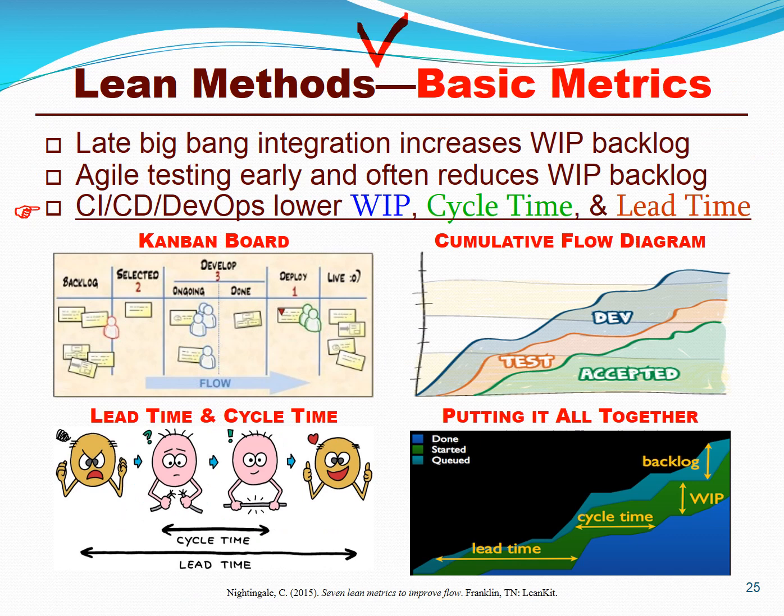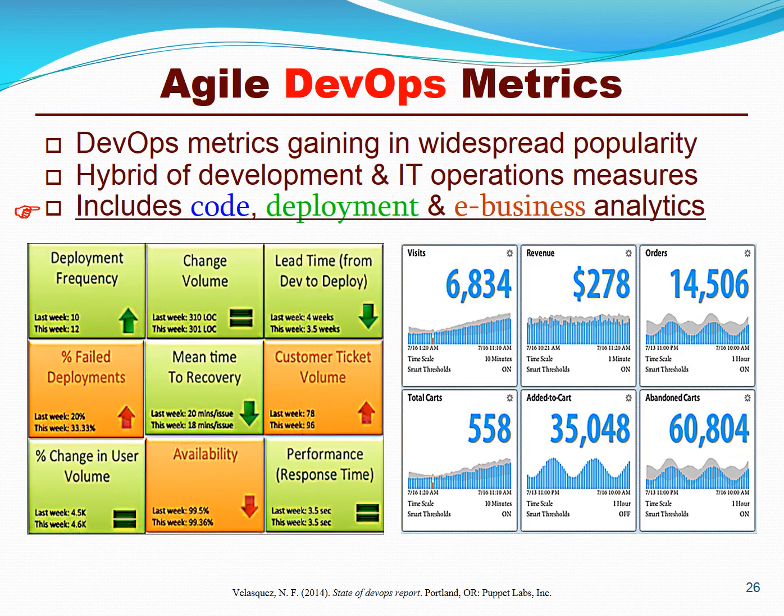From a lean and even agile perspective, two basic measures are lead time and cycle time. Lead time begins when a market need or a customer problem has been sensed. Cycle time begins when engineering or product development actually begins working on that problem, and both clocks stop when the product or service has reached market. So these become extremely important measures for determining both lean and agile performance.